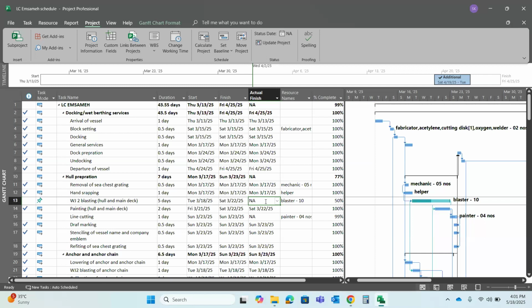First you make a schedule, then you assign the resources as manpower and equipment, and then you properly link your program, and then you assign it as a baseline. Then you update the percentage complete for each activity, click on update project, and shift the data date to whichever date you have updated. It will show you the remaining works and new dates, and from the new dates you can see how much time is balanced.